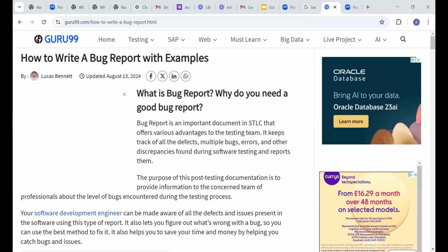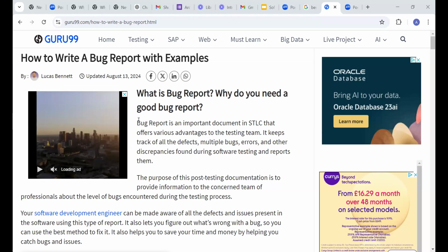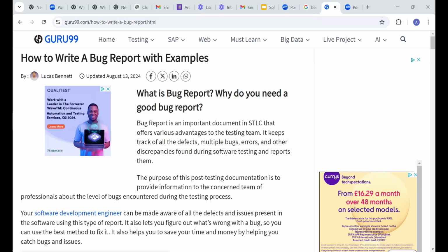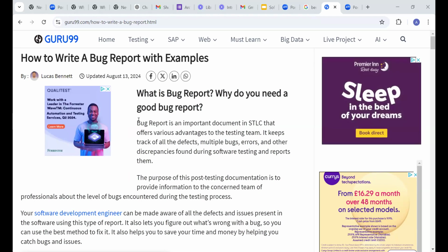But imagine if there's just 200 and let me say 180 have been closed and it's just 20. But that 20, you need to evaluate if the defects have a high impact on the application. If those 20 defects have high impacts, meaning they can pose risks to the application, your application can still not go live, right? Because you need to evaluate the defect if it's of high priority. We'll look at that shortly, actually.